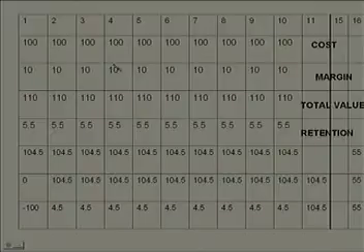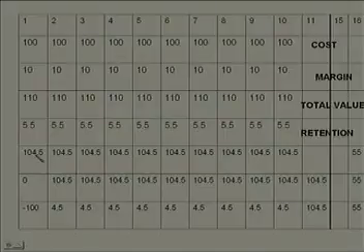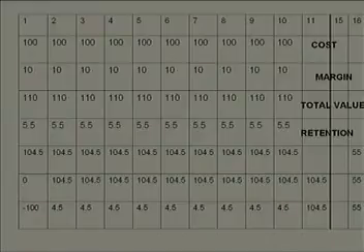So, what happens? How much is my bill which is due? This will be 110, which is my gross bill, minus 5.5, which is the retention amount. So, my net bill value is 110 minus 5.5 becomes 104.5. So, this figure continues right from month 1 to month 10. You will find the same figure getting repeated every month right from month 1 to month 10.